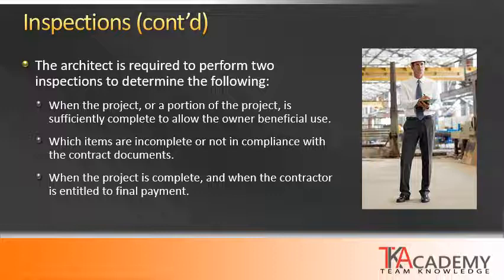The architect is inspecting to determine which items are incomplete or not in compliance with the contract documents. And they are inspecting to determine that when the project is complete and when the contractor is entitled to the final payment.